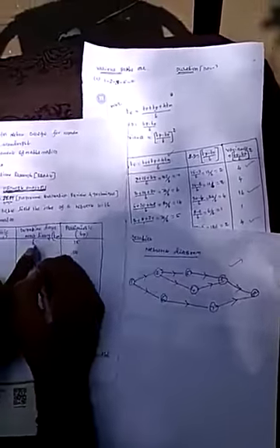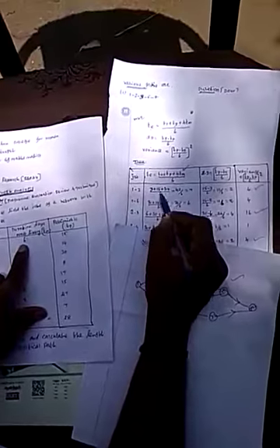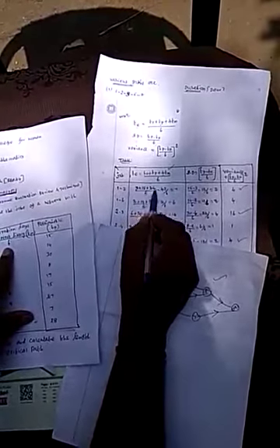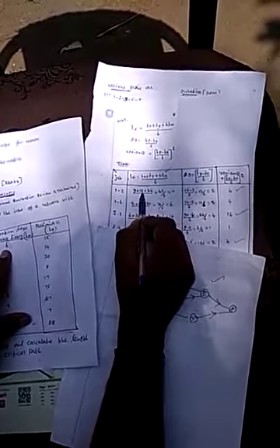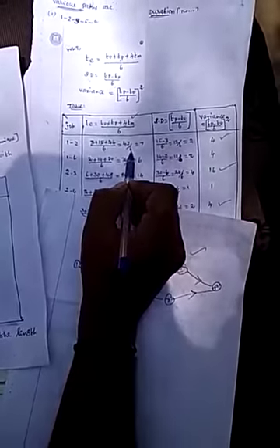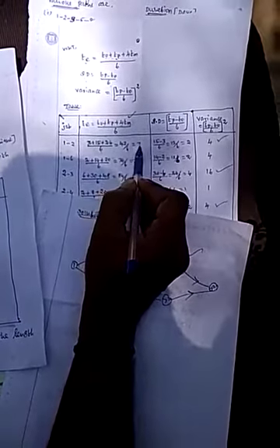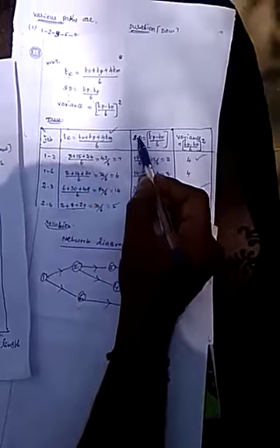Multiply the most likely time 6 by 4, which is 24. Adding the numerator, 3 plus 15 plus 24 is 42, and the denominator is 6. So the answer is 7.